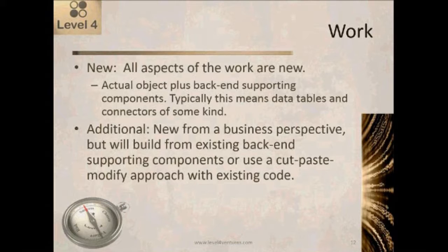So basically what we'll find is that the work to add an additional of something is a lot less, maybe a third of the work required to do a new of something. So a lot of times when we're getting change requests or added capability to an existing system, what we're dealing with is typically additional rather than new, because more often than not, we're building on something that's already there.